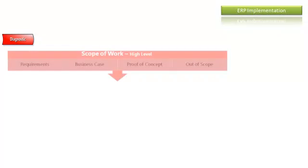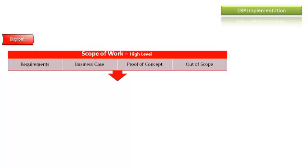The Diagnostic phase is where all pre-sales activities are done. The customer lists their requirements and business pain points at a high level. The customer identifies a business case to be examined in a proof of concept. The pre-sales consultant offers a proof of concept based on the customer's business case, in order to give evidence that the ERP can handle it. It's important to identify the project scope — what is in scope and what is out of scope — as that helps in setting the customer's expectations.